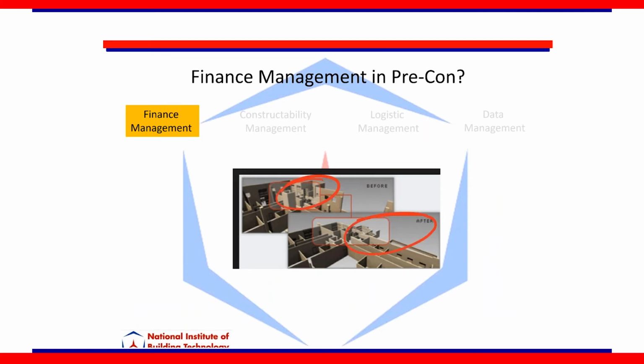Finance management. So this is extremely important, right? Before and after analysis. What happens is during the design process, things don't stay the same. So you might have a budget that you give to the client, but by the time the designing is done and engineering is done, the costs are completely different. And then guess what? The client is surprised. Then he has to run to get additional capital. There is frustration. There's a lot of things. There's no need for it. I think continued cost analysis is very important from a finance manager's perspective.